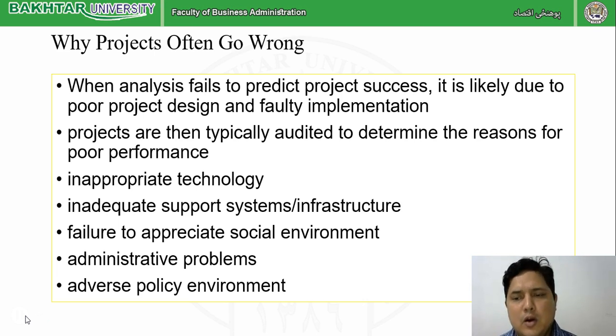So, use of inappropriate technology. Inappropriate may mean old technology that we are using. It may be technology which is not accurate. It may be the scale, the machinery, the measurement tools, or the supportive methods. Inadequate support system and infrastructure include everything: your team, your support from the management, getting things on time from the supplier. If the support system is inappropriate, that also makes the project delayed, and a delayed project is treated as a failed project.